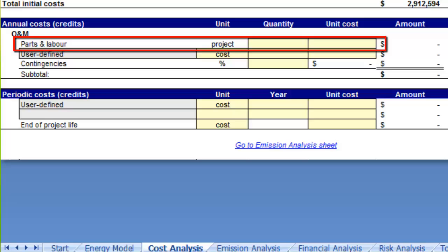Labor costs in isolated areas are typically twice the rate for urban locations in the same country. In these isolated areas, productivity is often less, as resources are limited, and an annual allowance should be made for travel and accommodation costs associated with annual maintenance. The costs proposed should thus be adjusted accordingly if appropriate.